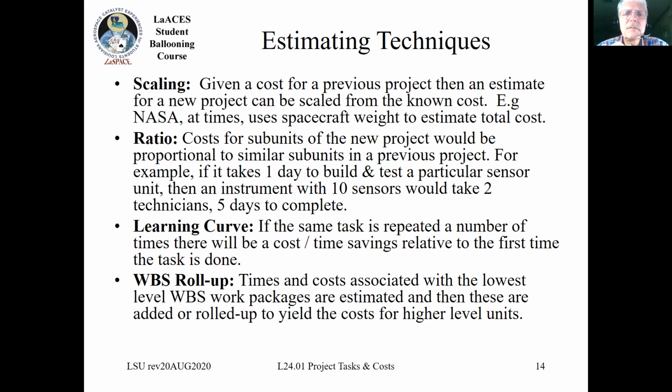There are some estimating techniques that are useful to know about that can help you with some of these things. So first of all, scaling. Given the cost of some previous entity or previous project, you can scale from that known cost to estimate what you are doing.